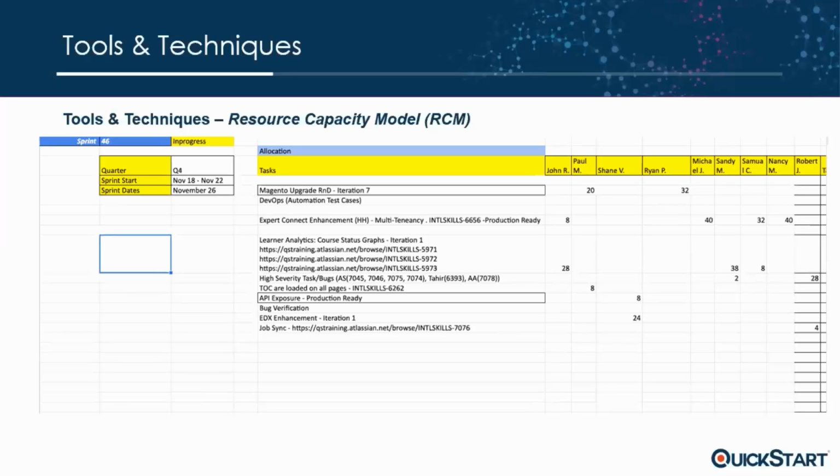If anybody is sick or if anybody is working on something else, and you have planned something else for them, then you have a problem, right? If there's a holiday coming up, 4th of July and whatnot, then your sprint cycle would be impacted because the sprint cycle is so short. So you want to make sure that you use some tool to know the capacity of your team, what will be delivered, and when it will be delivered.